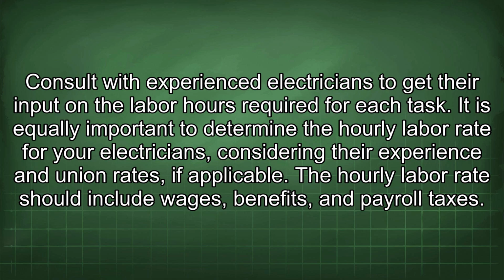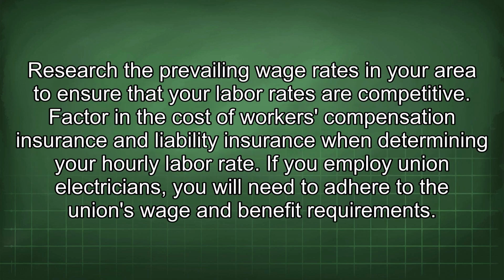It is equally important to determine the hourly labor rate for your electricians, considering their experience and union rates, if applicable. The hourly labor rate should include wages, benefits, and payroll taxes. Research the prevailing wage rates in your area to ensure that your labor rates are competitive. Factor in the cost of workers' compensation insurance and liability insurance when determining your hourly labor rate.